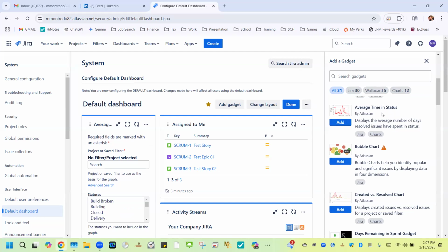If we have a good grooming process in place in which we groom stories once a week or once every 2 weeks, by grooming, we go through them with a comb to make sure that they're ready to be worked on and the team has everything that they need. That's what we mean by that. Let's say, for example, it sits in progress for 4 weeks, 5 weeks, 6 weeks. We might want to say, why do we have stories sitting in progress for so long? If on average, our sprints are about 2, 3 weeks, that wouldn't make any sense. So that's going to give us some insights for better outcomes.